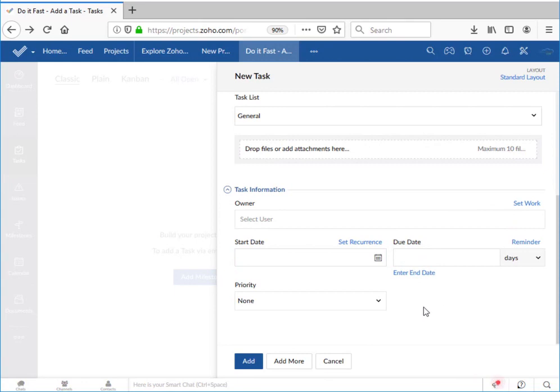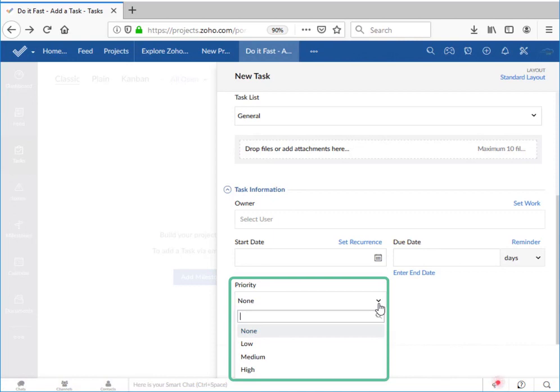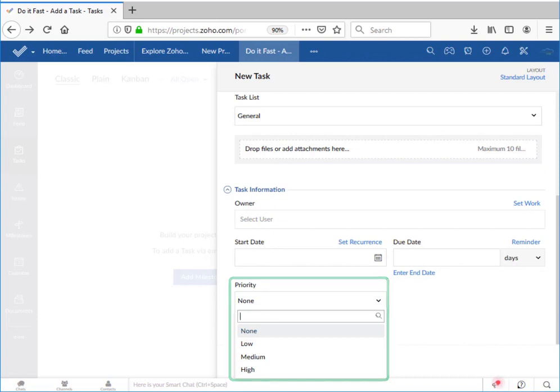And finally, we can set the priority of the task. This is a very agile kind of thing to include since it assumes that not everything is going to be done precisely on schedule and that some things are more important to deliver than others. There are four different priority levels here. And when we set that priority, we have only one more choice to make.